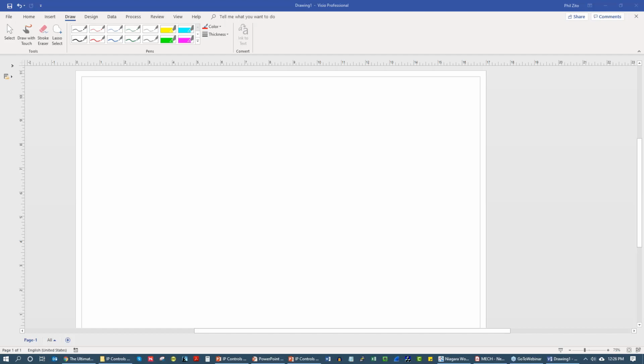Div 25 specs and design drawings to enforce the standard, including network architecture drawing. Yes, if the contractors support Div 25. That's a whole other conversation of getting Div 25 implemented. You primarily have to have a different construction delivery model than plan and spec in order to best utilize Div 25.